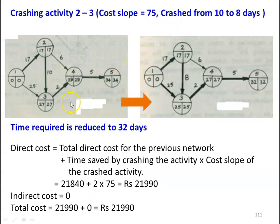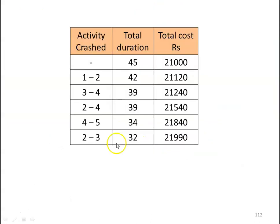Further crashing is not possible as all activities in the critical path have been crashed. The consolidated results table: normal duration 45 days, cost 21,000; crash 1-2 → 42 days, 21,120; crash 3-4 → 39 days, 21,240; crash 2-4 → 39 days, 21,540; crash 4-5 → 34 days, 21,840; crash 2-3 → 32 days, 21,990. The answer: total project duration is 32 days and the total minimum cost is 21,990.